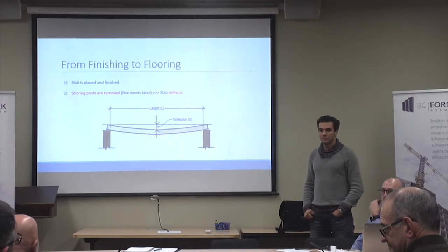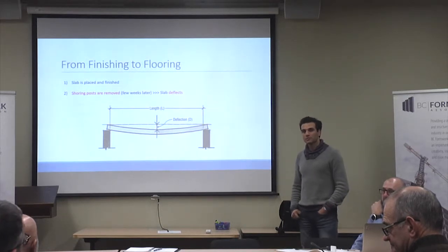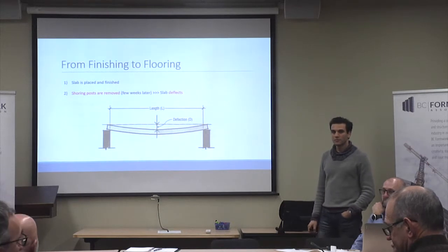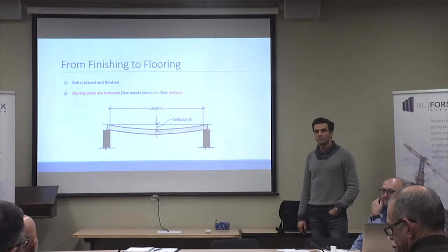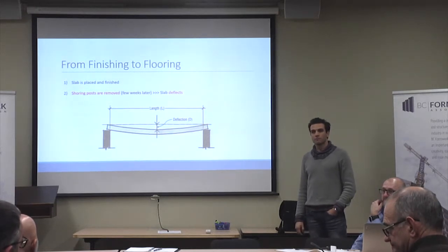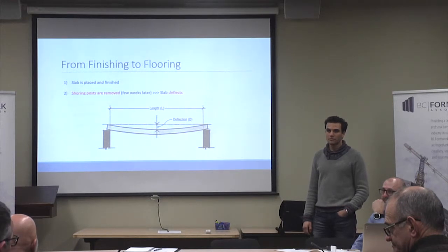And when you're stripping them, another thing we're doing wrong, we're stripping full areas at the same time. It's not supposed to be done like that. It's supposed to have reshore right away or take half of the tables down and put that, but it's so expensive. And someone has to decide about that. And the worst of everything is slabs are designed really so thin. That's the main issue. Because general contractors or developers, they're getting buildings for a smaller price.